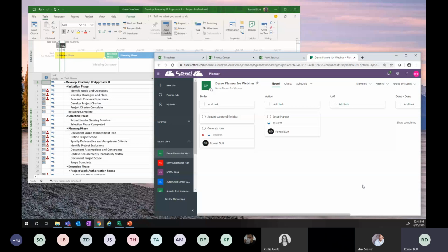There are a couple of questions on different types of projects and calendars. So you can certainly have different calendars within the technology. The calendars can be related to a group of employees. If you've got somebody who's working in a specific state who's only available X number of days, as we normally have across the board in Australia, you can have different calendars that cater for the availability.